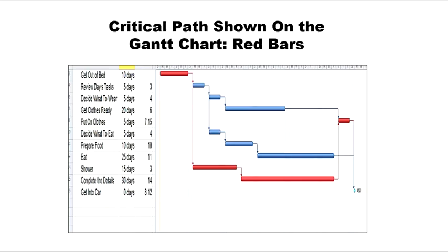Here in our Gantt chart we also see the critical path of the project, and we see the float time. All of those red tasks are the critical path of the project, ending with a milestone that on a Gantt chart is a little diamond-shaped piece. And the float time across there shows up in blue. We've told it we want to see it in a different color.